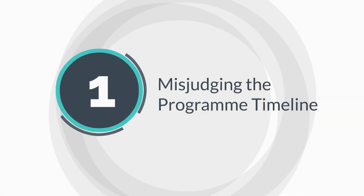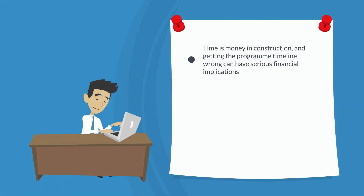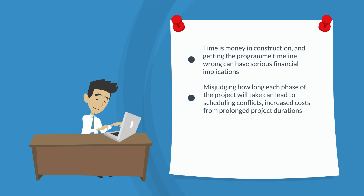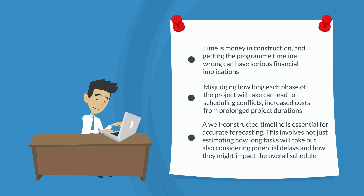Mistake one: misjudging the program timeline. Time is money in construction, and getting the program timeline wrong can have serious financial implications. Misjudging how long each phase of a project will take can lead to scheduling conflicts, increased costs from prolonged project duration, and even penalties for late completion. A well-constructed timeline is essential for accurate forecasting — this involves not just estimating how long tasks will take, but also considering potential delays and how they might impact the overall schedule.